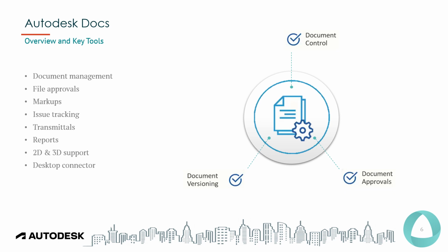Then you have your markups tool. You can create any markups and link important information such as other sheets and files directly. You can create and edit markups on PDF files, image files, and 2D elements that are contained within a drawing or a Revit file. All markup types will also persist through file versions. For example, if you create markups on one version, they will also display on version 2.